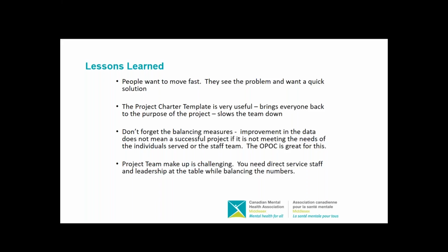And another lesson that we learned that's not on my slide is with the OPOC. So implementing the OPOC, one of the things that we noted was the number of staff that we initially give access to as data entry or admin, so people who can make the keys that relate to your specific program. It changed. Initially we had a few people. We didn't want it to be cumbersome, and it grew and grew.